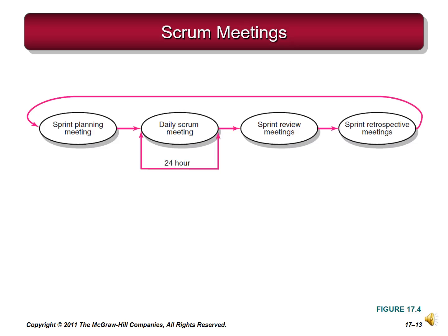Sprint review meetings are at the end of each sprint. The team demonstrates the actual work product increments they have built to the product owner and other relevant stakeholders. Feedback is solicited from the product owner and other relevant stakeholders. The product owner declares which items are done and which items need further work and are returned to the product backlog.